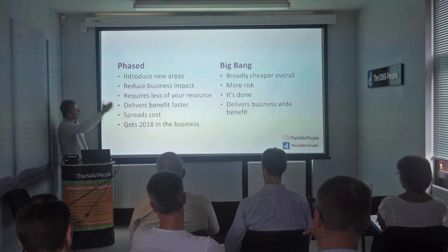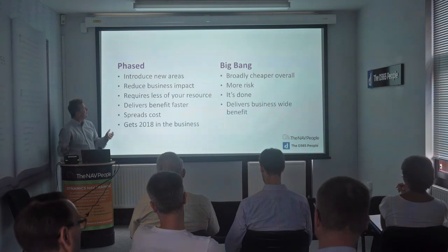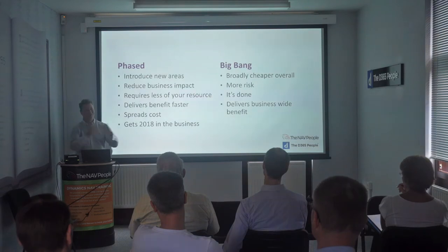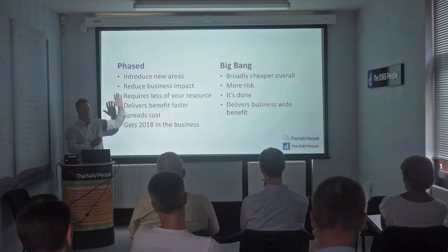And obviously, the two choices you have to make with these different ways of doing it are, do you want to do a full upgrade or do you want to do a phased approach? Obviously, if you do a full upgrade, it's hard to phase it because one day you're on the old version and the next you're on the new version. That's hard. Pretty much for the full upgrade, it's a big bang approach. So you're just going to do it.